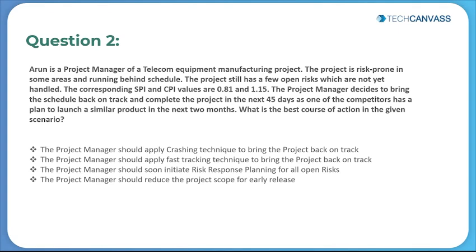Now, as per the situation in the question, crashing can be your best solution. I'll tell you why. Crashing is a schedule compression technique that shortens the project schedule without affecting the project scope. Approving overtime, bringing in additional resources, and paying to expedite delivery activities are valid examples of crashing.